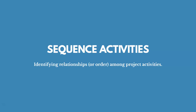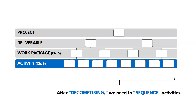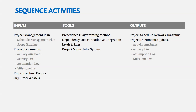Now let's move on to Sequence Activities — identifying relationships or order among project activities. We've already decomposed and defined our activities; now we just have to put them in the right order. Inputs include the project management plan (with the schedule management plan inside), and project documents — notably the activity attributes, activity list, and milestone list from the previous process, plus enterprise environmental factors and organizational process assets.